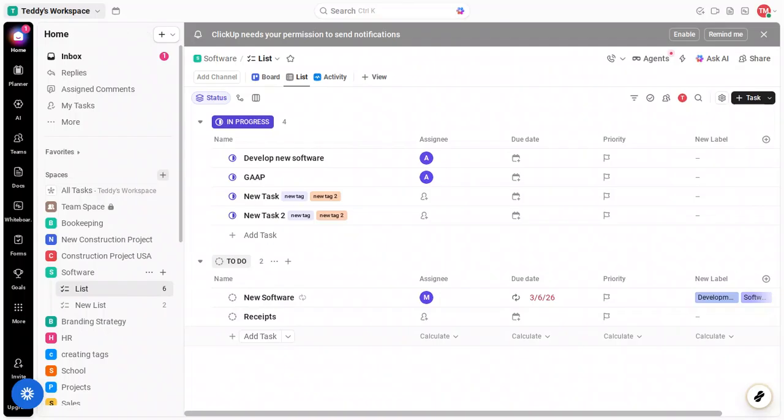You'll see flexible cadence options. You can set it to recur weekly, which is perfect for team check-ins, daily, for routine stand-ups or reports, or monthly. If you choose monthly, you can select same day each month for a reliable monthly cycle. You can also decide whether the task should repeat indefinitely or end on a certain date, or after a set number of occurrences. Just like that, your repeating schedule is defined.